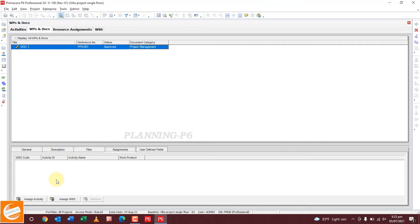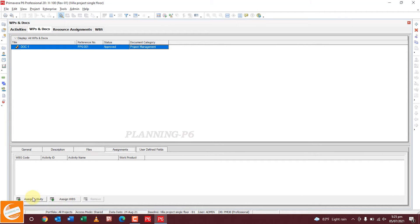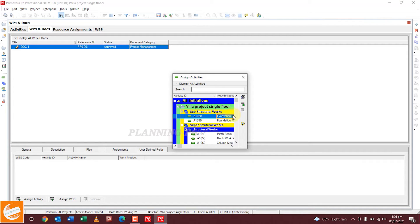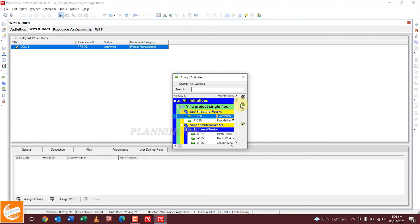For the activity assignment, you will assign the activity and the WBS. You can see here — we will assign these documents to an activity. For example, assign this document to the excavation activity — suppose it is a request for inspection for excavation. If this is a work product, check the Work Product checkbox.